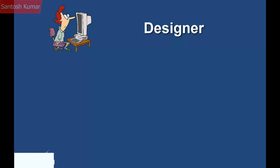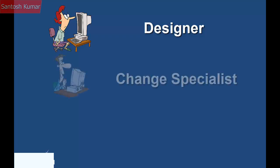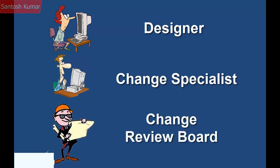In this presentation, the people involved in the change are: the Analyst Design Engineer, who will raise the PR and do most of the work elaborating the change; the Change Specialist, who is in charge of the change process and raises the change request and the change notice; and the Change Review Board, who will determine if a CR should be raised and review the change notice to see if the change will proceed.